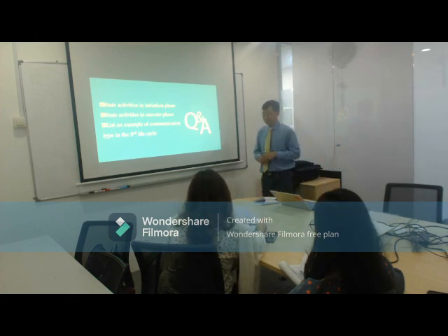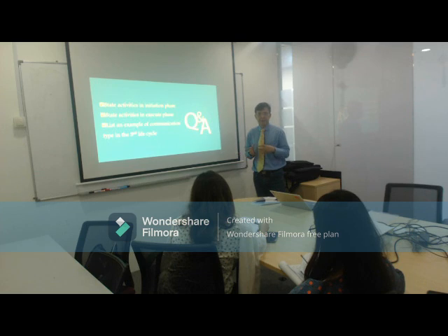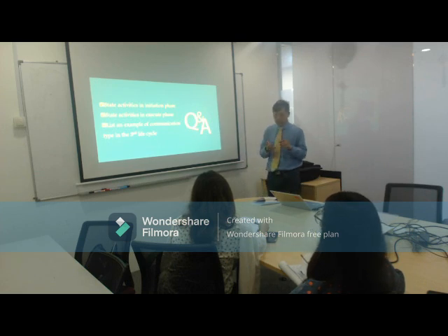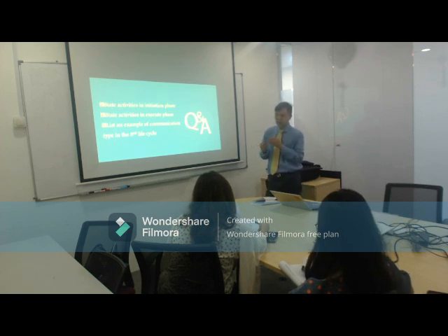Now, in the case where we are going to build a community bridge, one of the main things is this: community bridges are projects which are going to involve the land people, the agencies, the government departments and all that. So one of the examples is you may need to get a permit to build the bridge, your architecture diagram permits, right? There's a whole bunch of that. Normally you have to go to the local council and the building department to get all those permits. So those are the things that come into the picture.